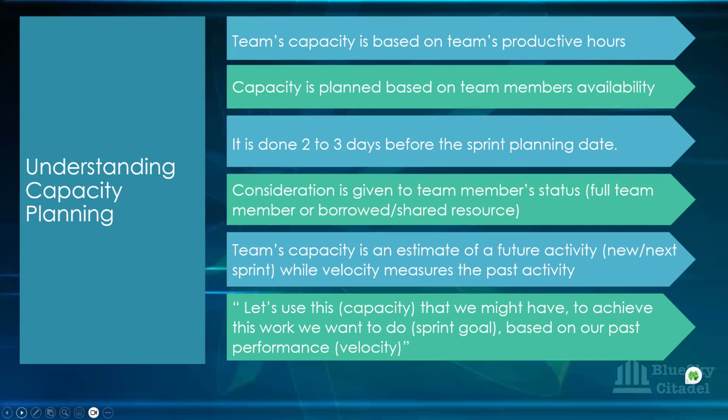because your velocity is just a reading on your dashboard. It doesn't know your capacity. Your velocity doesn't know the team's capacity. It can't pick that, oh, this person is off, this person is off. So it will give you an average velocity. Now that's where you come in as a scrum master. When your team are planning and they say, oh, our average velocity says 100, so we need to take in 100 story points and all that,